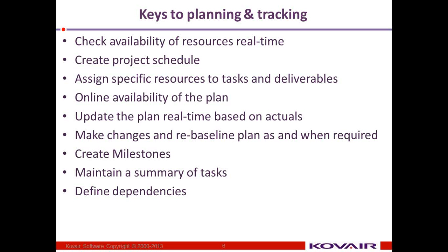Then another key aspect is to make changes and re-baseline the plan as and when required. Sometimes it happens that we cannot keep things under control and it gets shifted. Like we may face a lag in schedule, we may be lacking on cost, somewhere we may be out of track. And as soon as that happens, it is very necessary that we make the corresponding changes in the